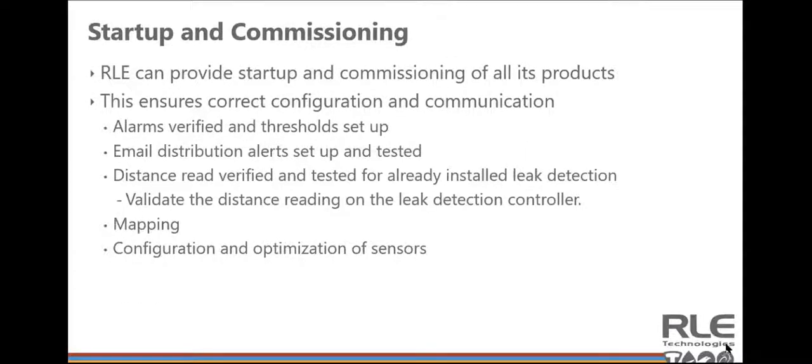Next is our startup and commissioning. If you already have a product installed, we can come in and do startup and commissioning services for you. This isn't just a look at the stuff, oh yeah, it's installed, and walk away. No, this is in-depth testing, mapping, and checking of a system that best practices were followed, that the system is working, and it's tested repeatedly during the mapping process.